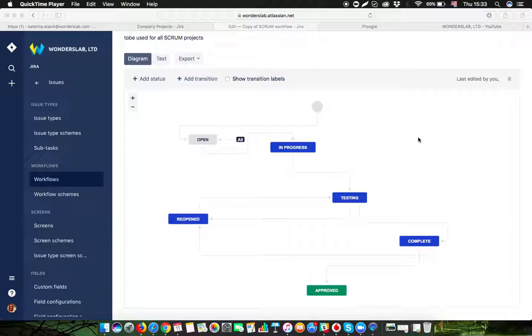The third stage is to write the code. Implement what has been described and depicted. The fourth stage is to check what you've done: user acceptance testing. There needs to be a person who checks everything against the definition of done before the product owner gets to it.